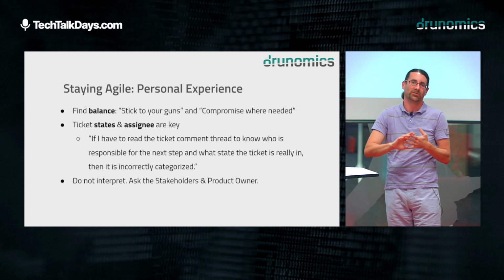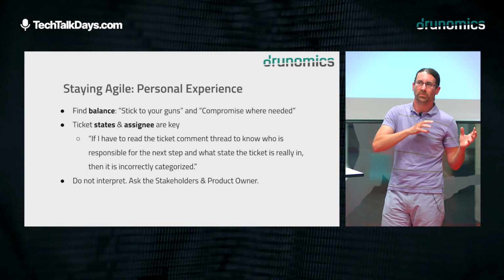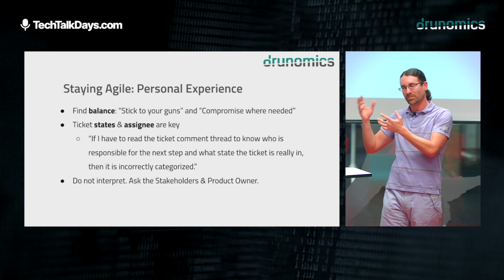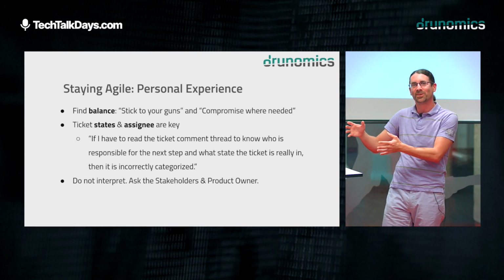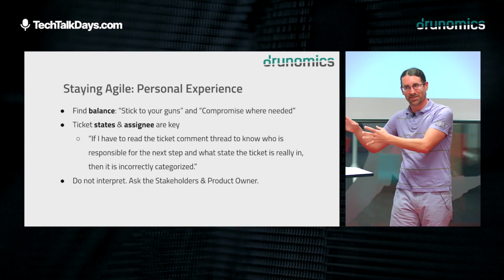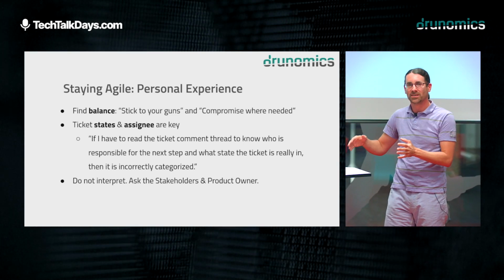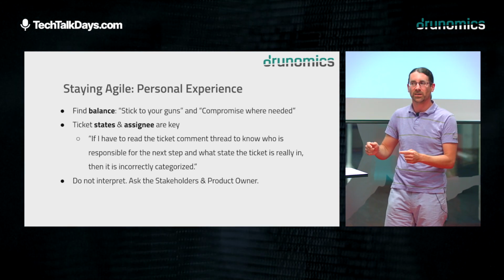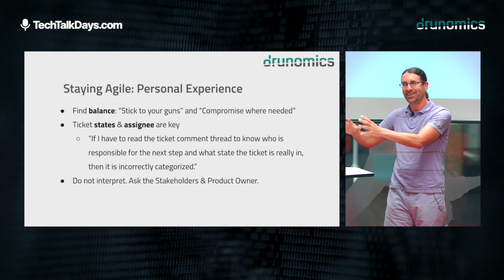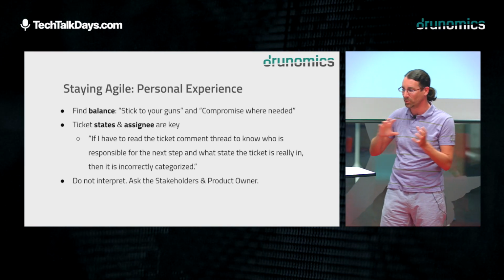So the assignee is really important. The ticket state is very important. You always want it to be able to be moved. So one of the things that a couple of key people at drunomics keep mentioning is, what is the next step to do for this ticket? And when the developer tells me, actually, that should be this and this, and then my answer immediately is, well, okay, why isn't that in the description of the ticket of what needs to happen next? So we consistently try to do this summary update in the ticket and get that moving.